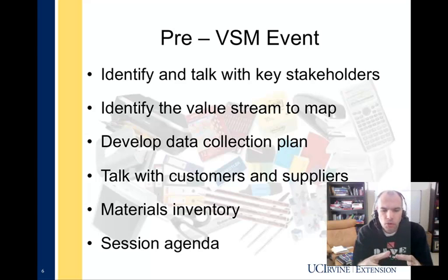And then the agenda. You want to make sure that you know exactly what you're going to be doing every minute of this session. So typically when I create my agendas, I just lay out how are we going to work through this process of creating our value stream map, about how much time are we going to need for each of these steps in the process, and factoring in breaks and lunches is also going to tell you how much time you're typically going to need. Now it really depends on how detailed you get into the value stream map and how big of a value stream you're mapping as to how long it's going to take. But on average, it takes about a day to 2 days typically to do a really robust value stream.